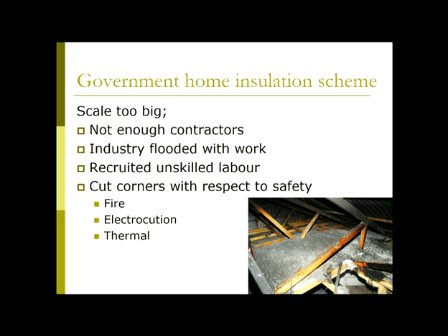One guy died simply by being in a roof on an extremely hot day, so it was like an oven in there, and he died just through thermal exhaustion. And there were also something like 105 roof fires caused by electrical short-circuiting after the installations. And so in 2009, the whole project had to be pulled after people had died, and there had also been all of these house fires causing heaps of damage and trauma to the homeowners.